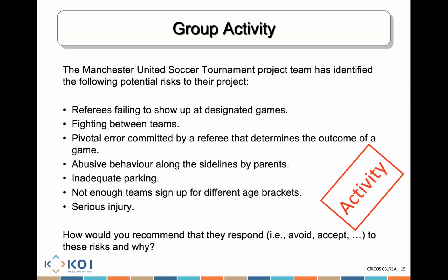How do you mitigate it? The person who is working, we know that there will be something like that. So the area near the tournament, we can talk with them. We'll be selling the exact amount of tickets. Could be that, and we could also schedule games to be at different times instead of all being at the same time. You know, like I schedule one at 11, one at 12, one at 1, whatever they are.